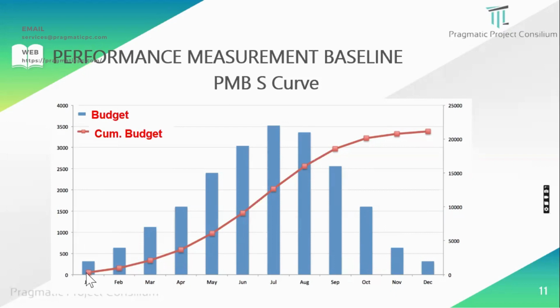And if you see in the beginning, the curve and the resource start with very minimal spending, and when it comes to the peak, it goes higher, and therefore there is a different curve here from May to August. Initially we have a different type of curve, and here a different curve. At the end of the project, again, the budgetary spending plans slowly decrease. Accordingly, the curve level also comes down, I mean, the change in the curve edges.